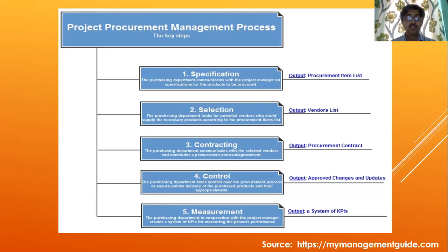What will be the approaches of selection? As I told you in the previous cases as well, we can take basically two approaches. One is the experience-based approach. If you had worked on the same kind of project with a group of vendors or a single vendor, and if you are satisfied with their performance, you can return to them and place the order. This is one area. Or if the project area is completely new and you do not have any experience, then you can draw some analogy with the same kind of projects done by other organizations and where they are procuring the things from.